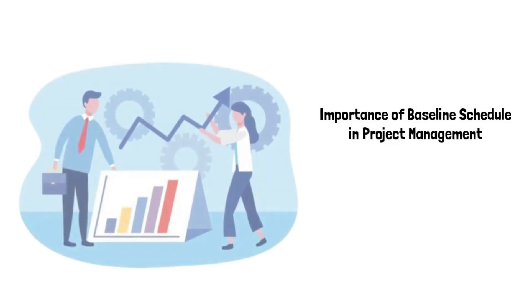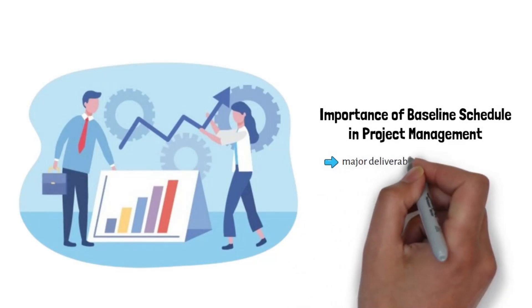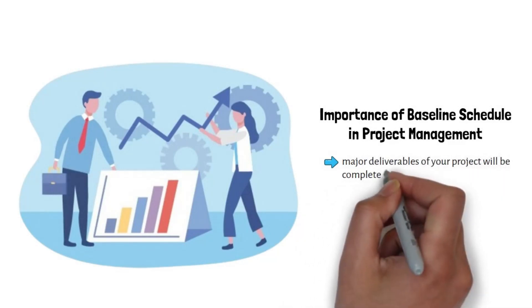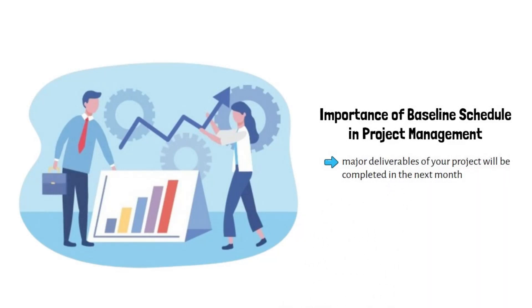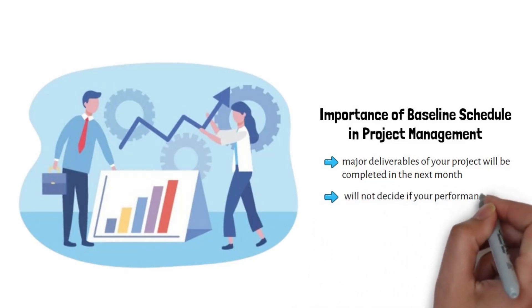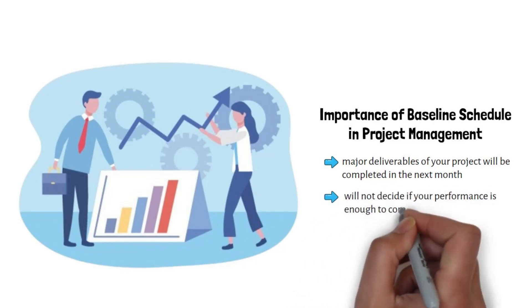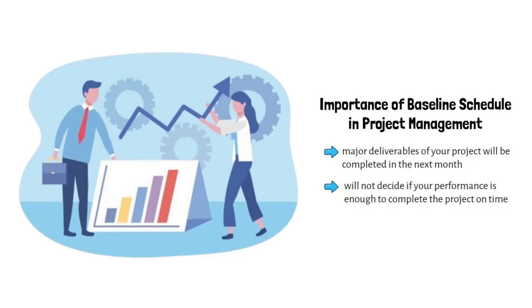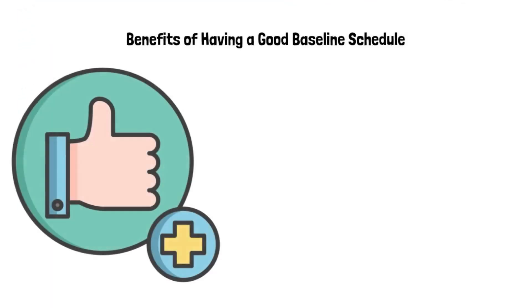A baseline schedule allows you to understand the performance of your tasks over time. For example, let's say major deliverables of your project will be completed next month — if you don't have a schedule baseline, you will not be able to decide if your performance is enough to complete the project on time.